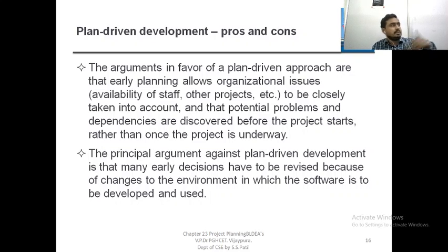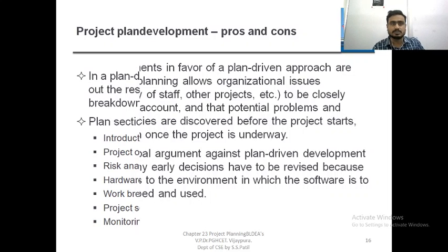The principal argument against plan driven development is that many early decisions may have to be revised because of changes to the environment in which the software is to be developed and used.